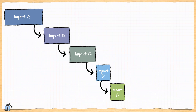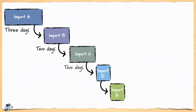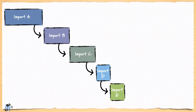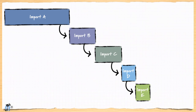There were five different file formats to support, and each was, of course, different. The programmer thought about the five file formats and decided on a sequence in which he would do the work. The first format would take the longest because he would be building up some reusable code and a framework. He estimated three days to import data from format A, two days for each of the next two formats, and then a day each for the last two. But when he wrote the code to import from format A, it took 50% longer than planned.